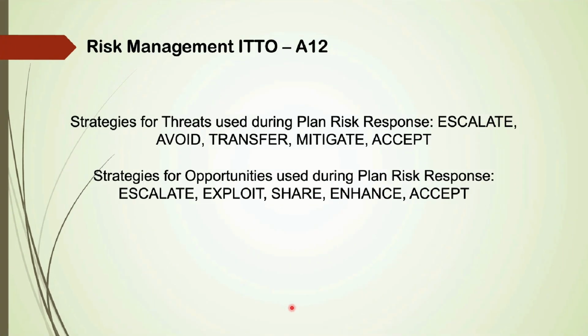Answers could be: strategies for threats used during plan risk response may be escalate, avoid, transfer, mitigate, or accept. And strategies for opportunities during plan risk response could be escalate, exploit, share, enhance, or accept. Read about each one of them from PMBOK Edition 6.